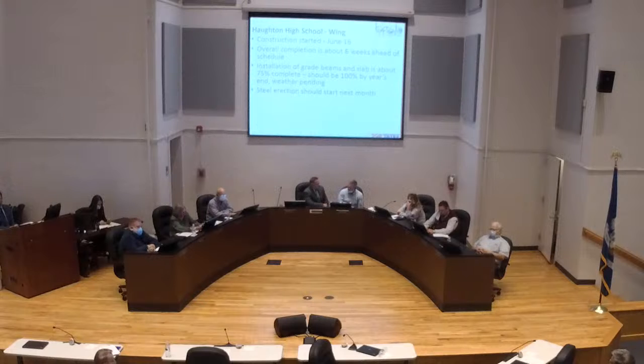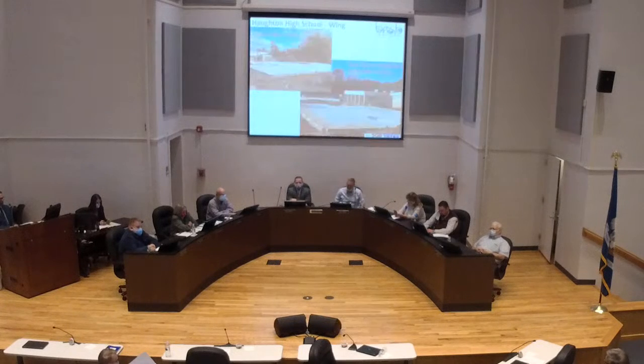The contractor, we met with him this afternoon. He plans to start erecting the steel on the west side, which is where the admin is, and then do work from west to east to support the existing admin building. So next month we'll start seeing some vertical construction, really seeing some progress on that. Any questions on that slide?